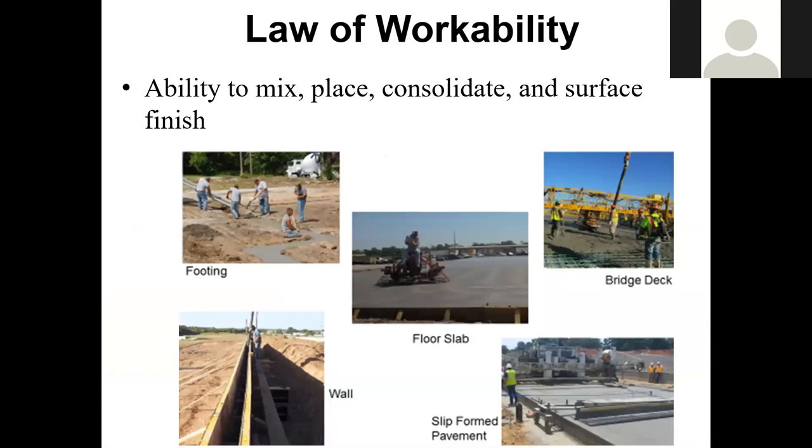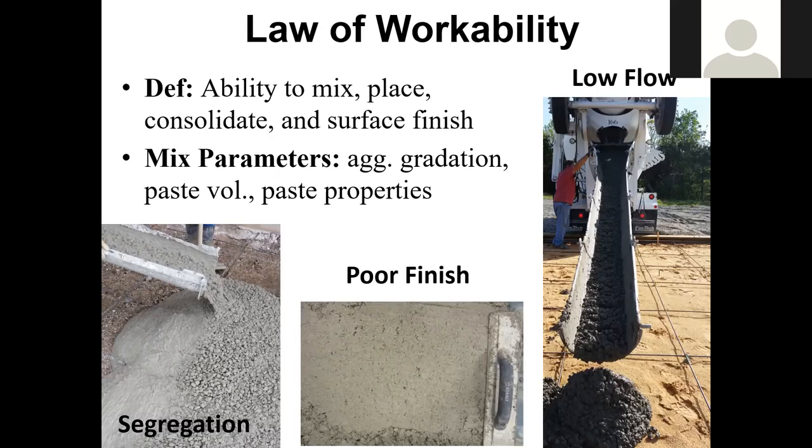But you could, and that's actually what we did. They trimmed out over 60 gallons of water in this truck. And when we added that back in, it got to the slump that we needed. However, they didn't tell us that. We said, we're pouring, we need a 6-inch slump today. Is it ready? And they said, oh yeah, it looks great. Well, it came down the chute and we're like, well, you're not ready. So then I had to add water and it slowed up what we're doing. And we needed to be really fast paced when we were pouring this. So it kind of messed up what we were doing.